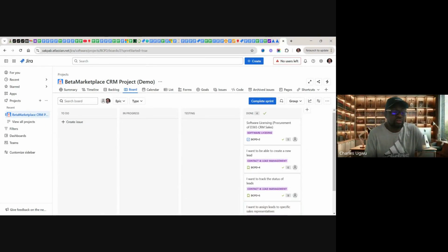You've completed everything. It's not a must that you complete the work items, but it's a best practice if you complete them. But if you couldn't complete them and the sprint is about to end, meaning that you bit more than you can chew, then you move those work items back to the product backlog to form the next work that is going to be carried out, or the next sprint. And that's it.